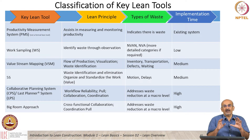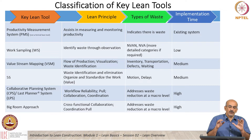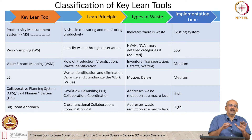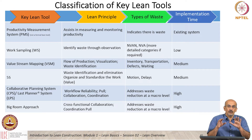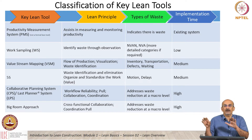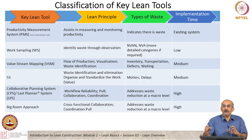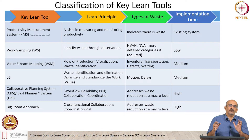With 5S, by having a site organized extremely well, you are eliminating a lot of motions and delays. We are able to standardize many things and avoid wasting time searching for or arranging things because everything is standardized. It definitely adds a lot of value to how work is done, but requires a system and will take a medium level of effort to implement — based on what we have experienced with different implementations we have done.